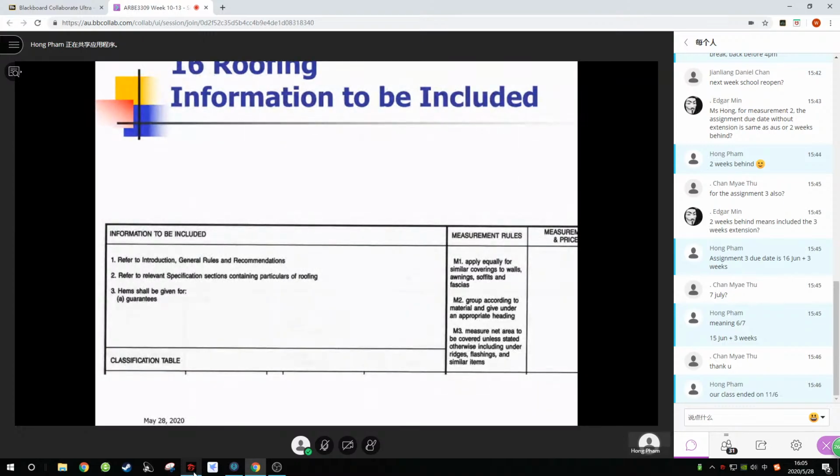If ever you're working with a membrane roof, while we're talking about guarantees, remember that the guarantee they give is that they will replace the membrane. The big trick is it's the same as membrane under tiling, membrane on roofing. They replace the membrane, but if you've put a slab over the top of that membrane, they don't do anything for that.